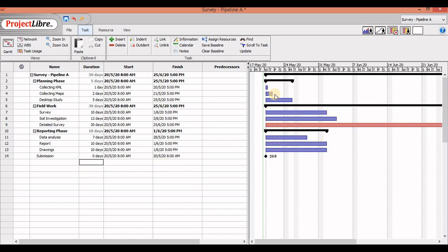Now, when you look at this bar chart here, 1 day, so automatically gets a chart here. 1 day, 2 days, 5 days, and it considers your Sunday too. So this is actually 6 days.